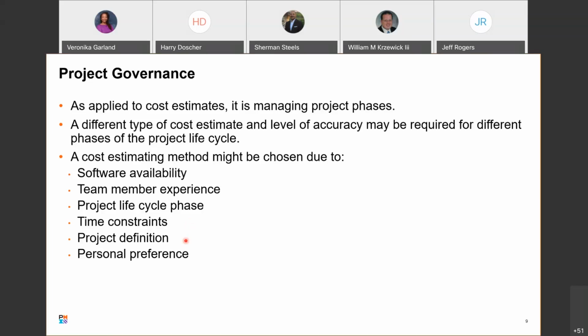An agile estimate, you're looking at estimating 2-week increments. Then you're talking about 10 to 12-week program increments. So that's different from a waterfall project where you're estimating requirements, design, development, testing. Okay. So each of those phases is included in an agile project for each of the iterations. And then if you've got experience or you've had success with a particular estimating technique, then go for it. If you can use it, more power to you.